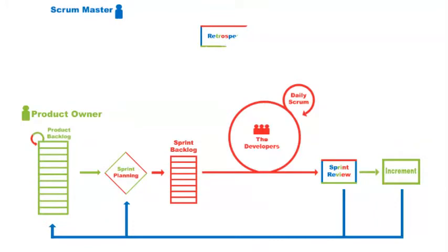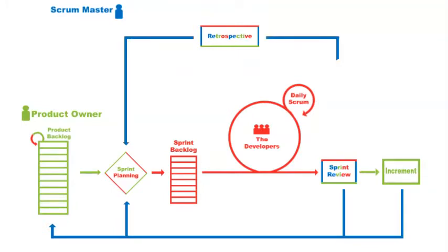The retrospective is the opportunity at the end of the sprint in which the Scrum team can inspect its implementation of Scrum as a process framework. The interactions of the people within the team, as well as any required skills in order to deliver the solution, are also discussed while reviewing these to consider opportunities for continuous improvement. This provides an improvement feedback loop for the Scrum team, which should take at least one continuous improvement goal into each sprint as a target to achieve.